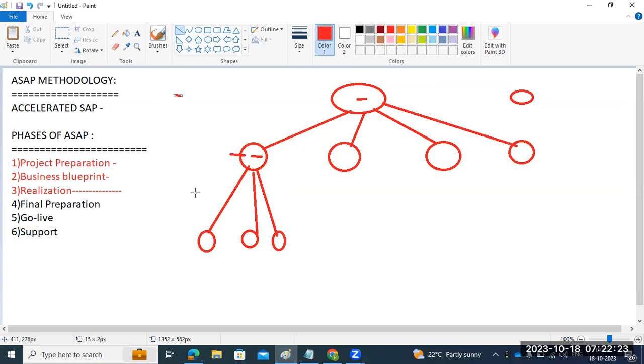And here we need help from the infra team, and the operating system team is also required. There is one more manager for that. So you need to coordinate with the operating system team. Once the infrastructure is ready, then the team will start building the systems. So we have a dependency here.